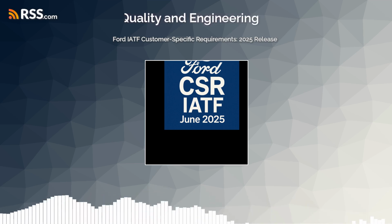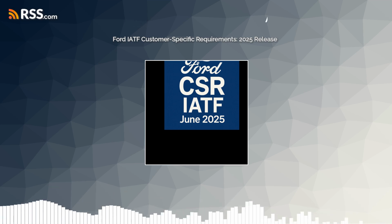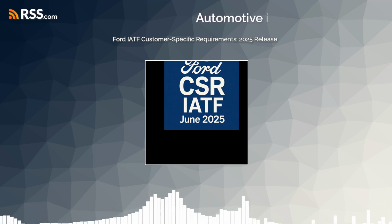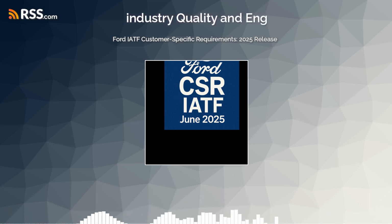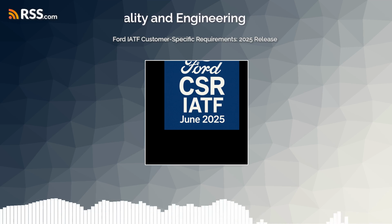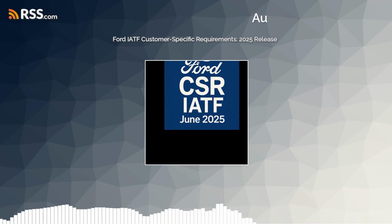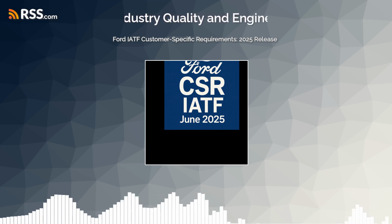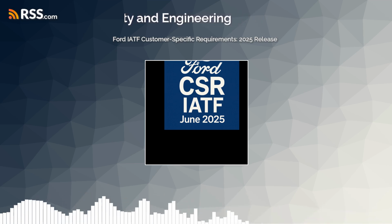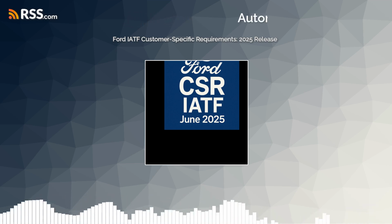Problem-solving isn't just about fixing the current issue. It's about updating the knowledge base to prevent recurrence across similar processes in the future. Makes sense. Feed the lessons learned back into the system, and using specific FMEA software is required now. Yes, the document states suppliers shall use FMEA software, which ensures the alignment of the Foundation FMEA, Part FMEA, control plan, and other applicable documents. This drives suppliers towards integrated digital tools that automatically link these documents and enforce data flow, making traceability and updates much more robust and less prone to error.